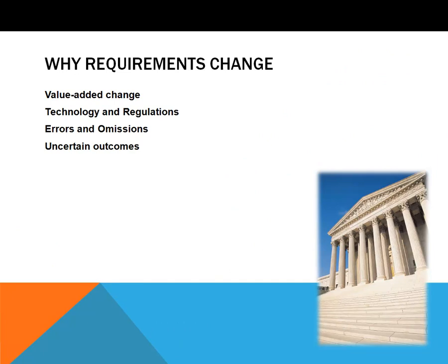It could be a value-add change, that as more information has become available, the change is legitimate and needs to be made. There could be a change in the technology or the regulations and laws that affect the technology that affect your solution. Chances are, though, you're doing change because of errors and omissions, that the requirements were poor to begin with, or the requirements forgot to include certain stakeholders, which have caused more requirements to be introduced.